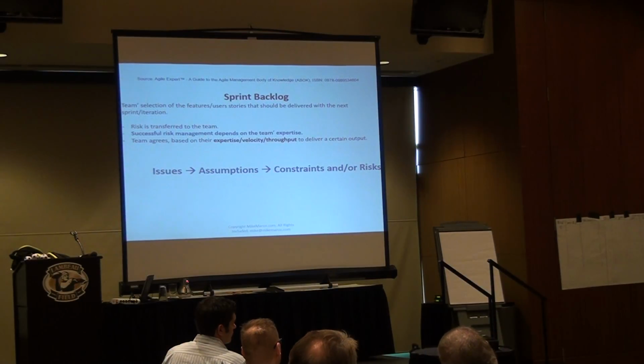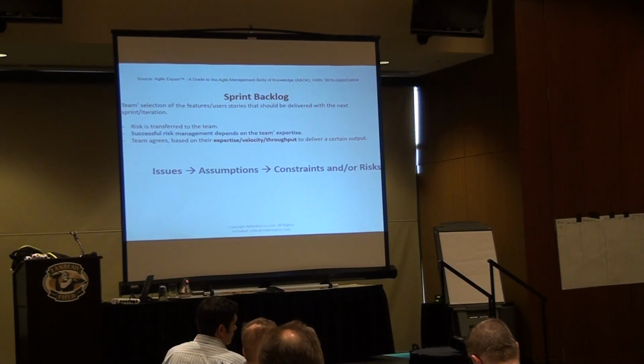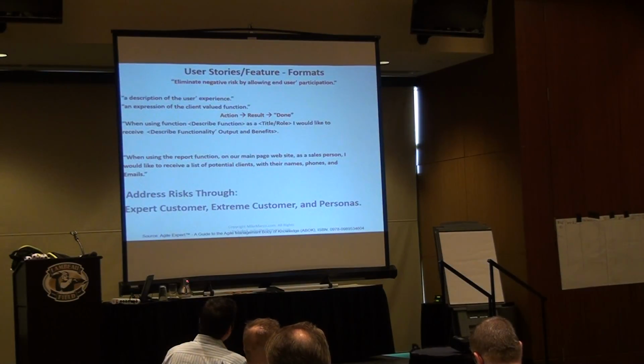And then when you move into execution, assumptions should become either constraints or risks. There are no assumptions in execution. And again, that's why it's important that we engage stakeholders in this decomposition process. So we don't go with the assumption like, oh, I didn't know. Nobody told me. That was my excuse for spinning figures and stuff like that. Okay. So we go through the process of decomposition.